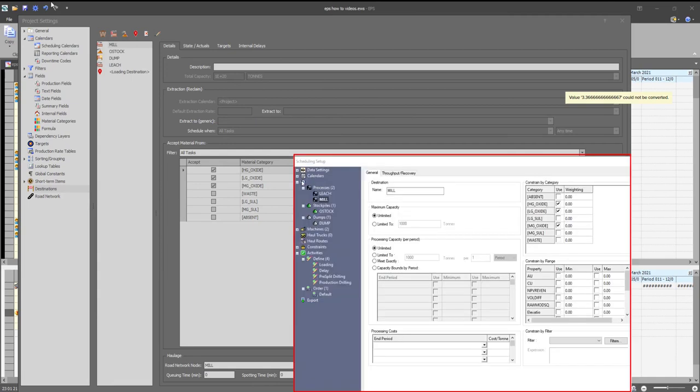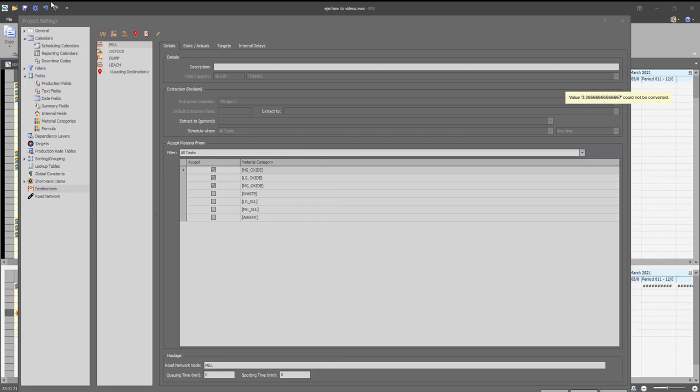The destinations defined on Studio OP are mapped on the destinations page on the project settings on EPS.